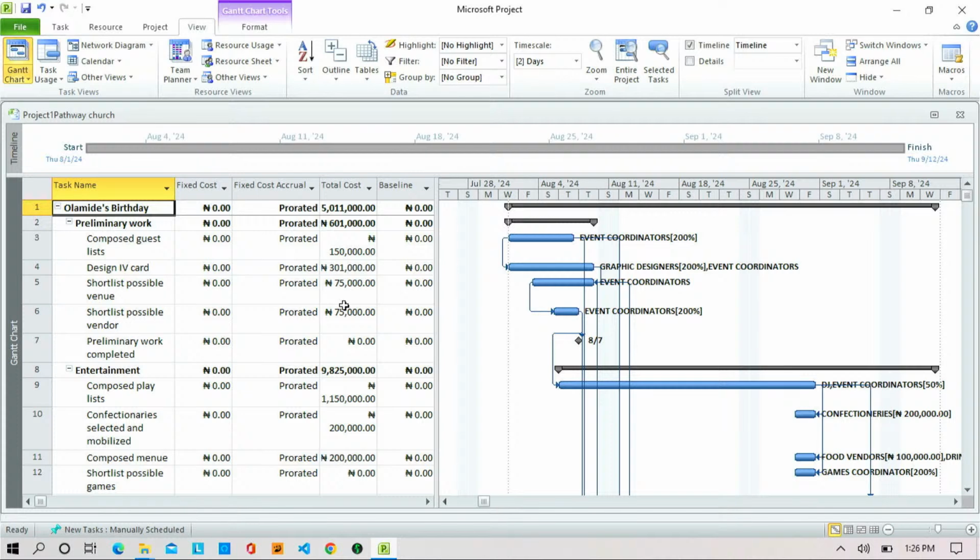Now you want to build a duplex. You have engaged your architect to do that for you. Is that okay? Now, before you move to site to start the construction, you call your engineer friends. You call your other architects to look at what your architect has done. Now, during the course of reviewing what is done, they say this building does not have room for laundry. There should be a laundry room. Or put a laundry room into it. That kind of change request is what? A preventive action. You understand? It's still at the design, at the planning stage.